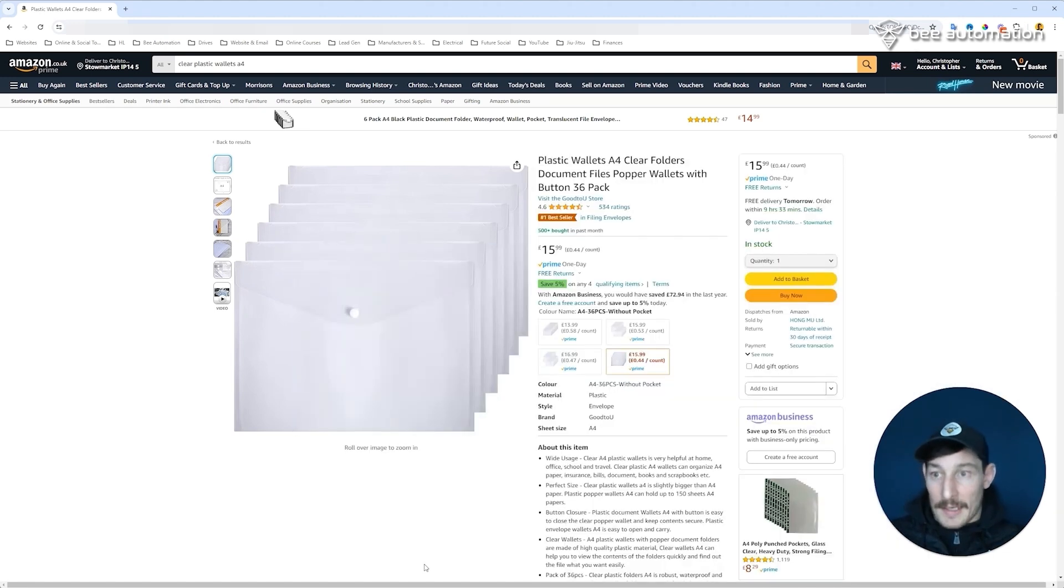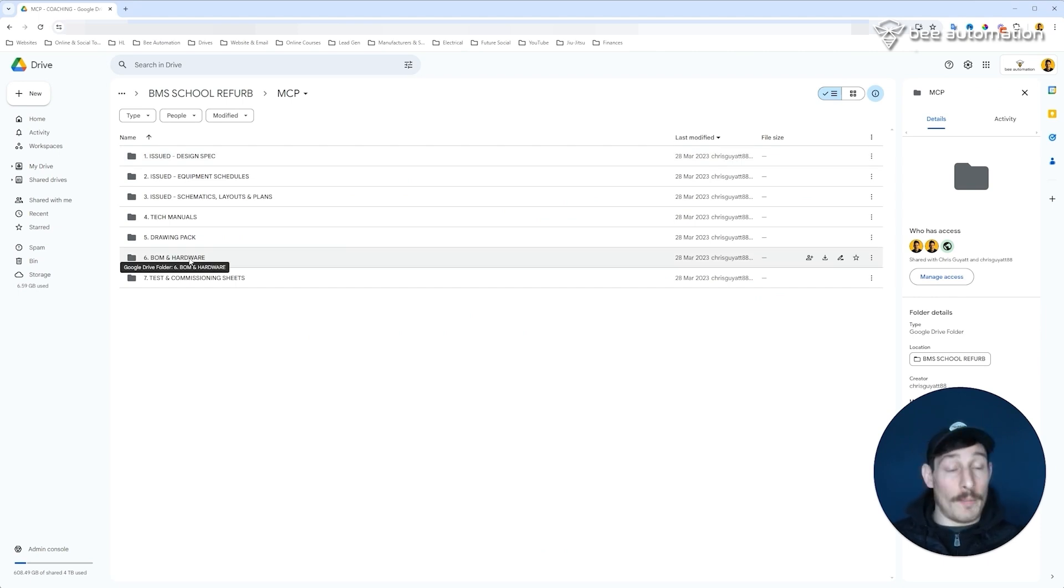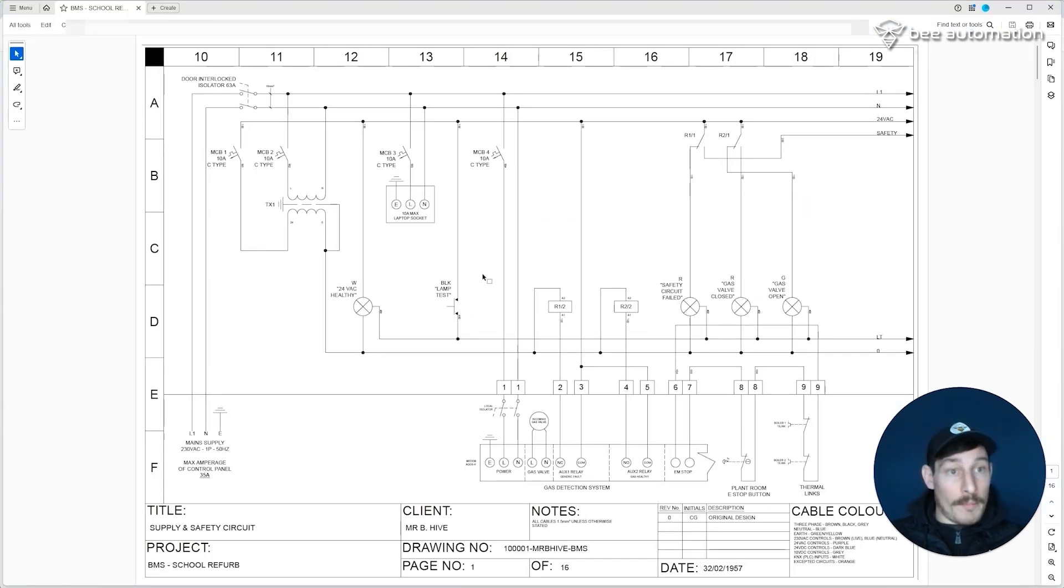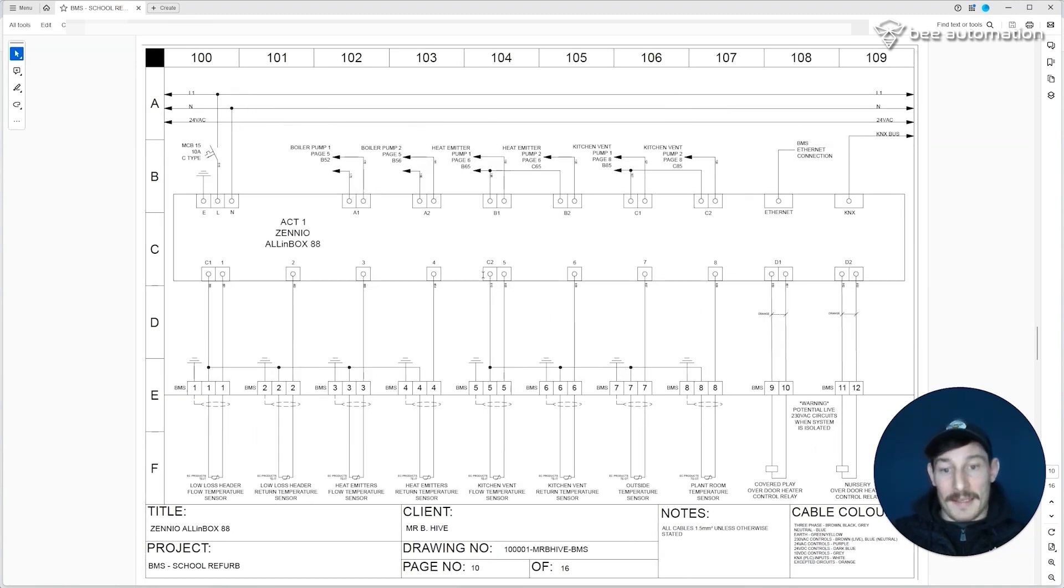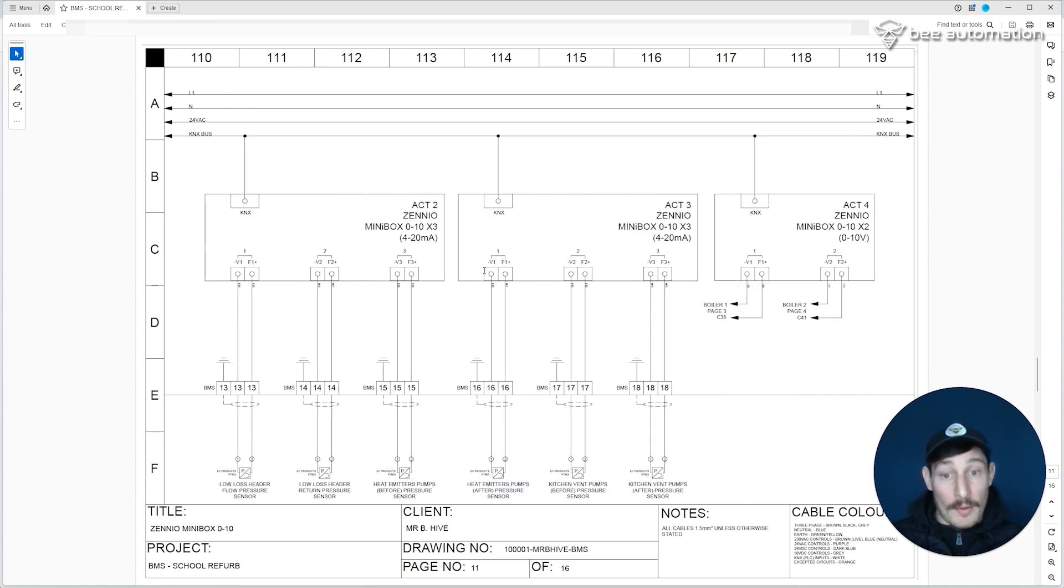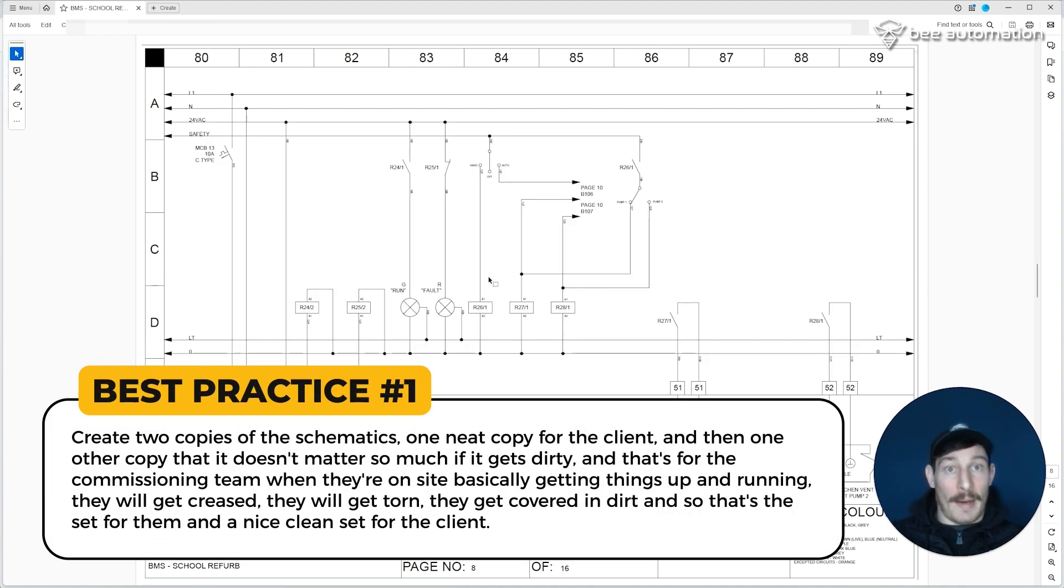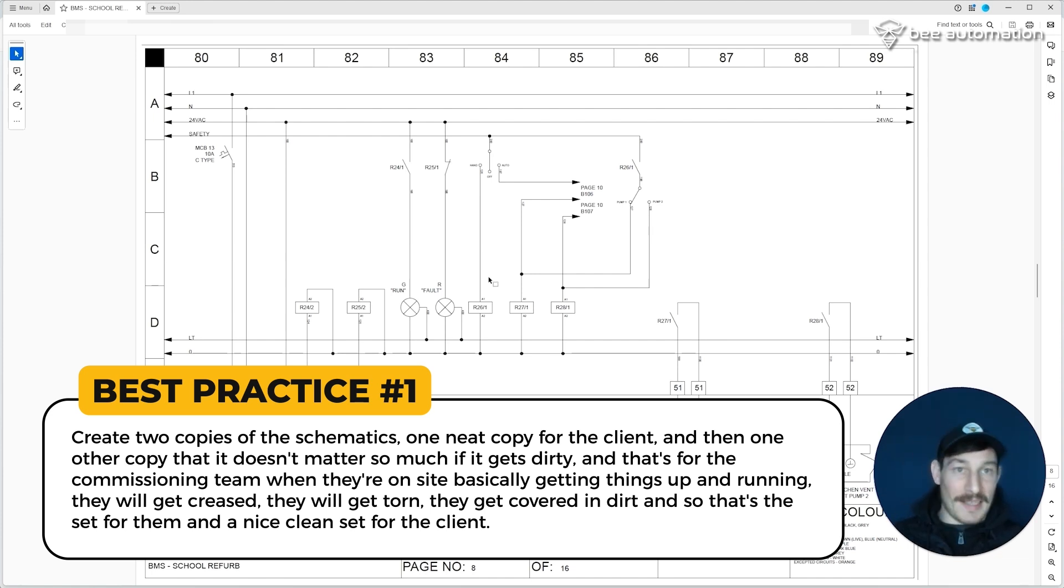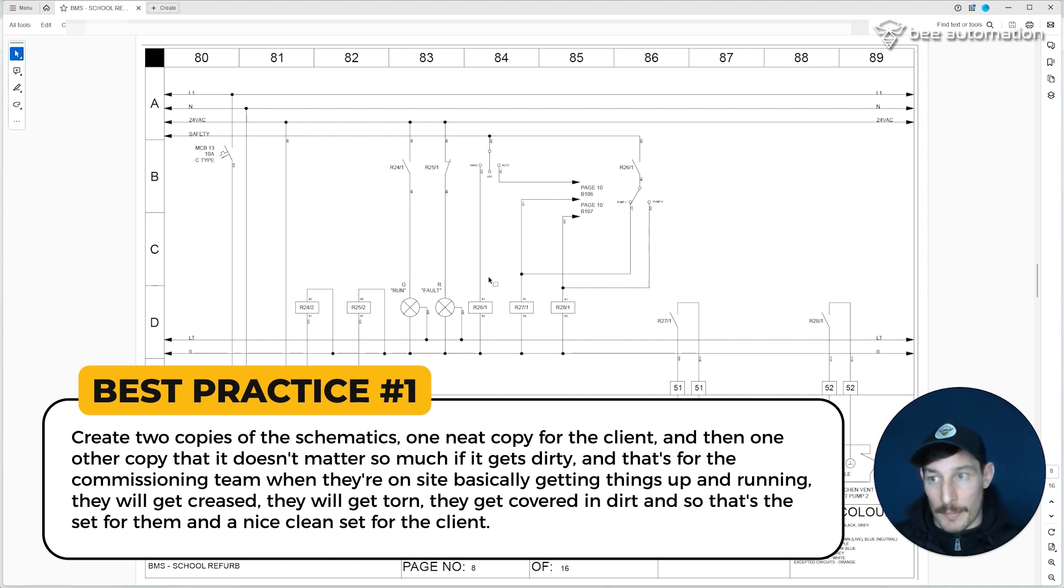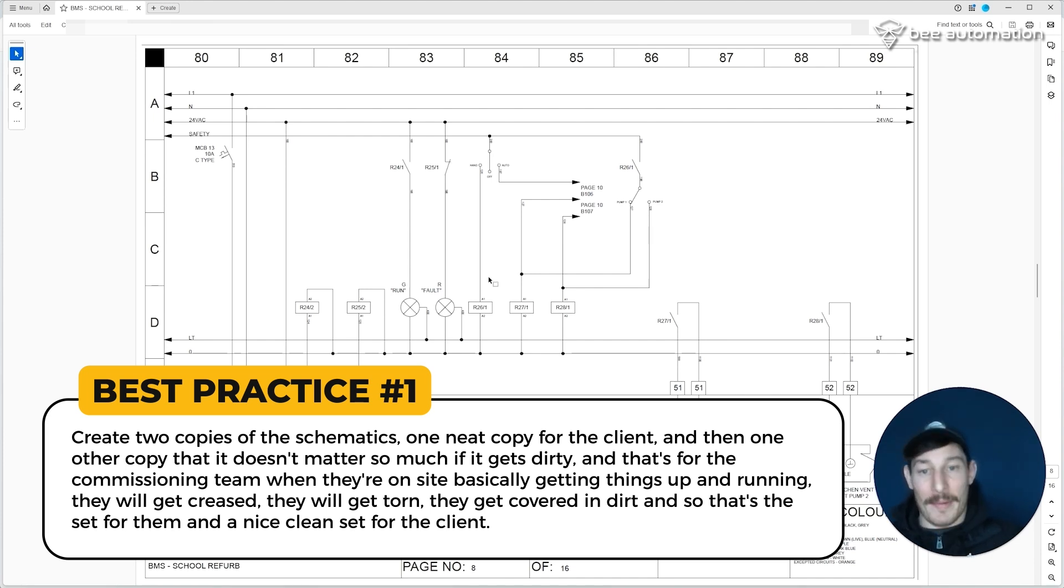That's the actual physical site pack. Now what goes into that is really up to you, but for me, the first thing, obvious thing, would be the schematics. So I would print off all of the schematics after we've done the red pen and the updates. Once I'm happy with all of those and they're done, I would print all of these out in A3 and add them into the wallet. I would create two copies of the schematics: one neat copy for the client, and then one other copy that it doesn't matter so much if they get dirty. That's for the commissioning team when they're on site, basically getting things up and running. They will get creased, they will get torn, they get covered in dirt, so that's a set for them and a nice clean set for the client.